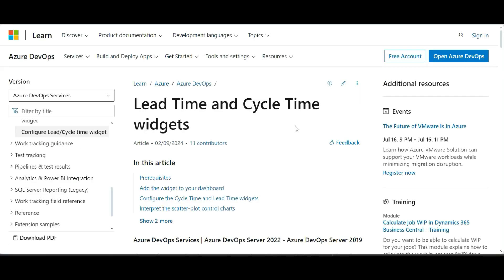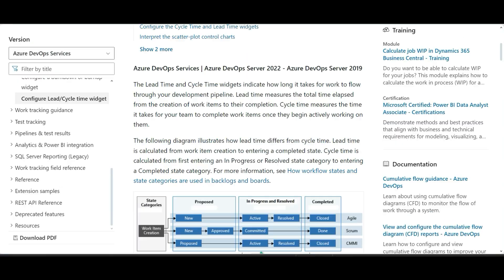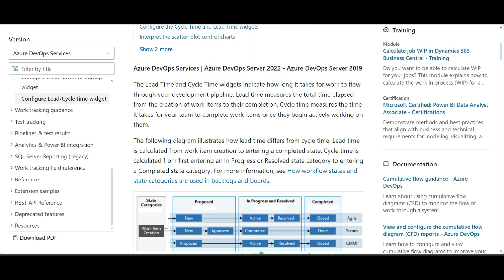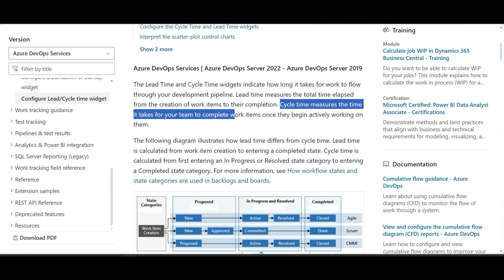Cycle time and lead time tell you how long it takes for work to flow through a development pipeline. Cycle time specifically measures the time it takes for your team to complete the work — which is exactly what we want here.